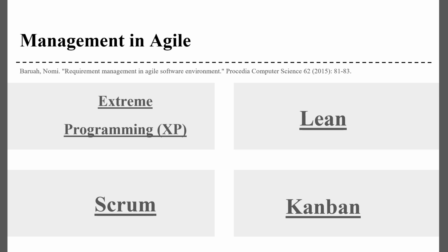Starting with extreme programming that takes a distinctive approach to requirements by utilizing user stories and engaging in on-site customer interactions. Written cards serve as flexible promises for conversation, with no strict requirements for completeness. Post-implementation, story cards are discarded, reflecting XP's iterative and adaptive nature.